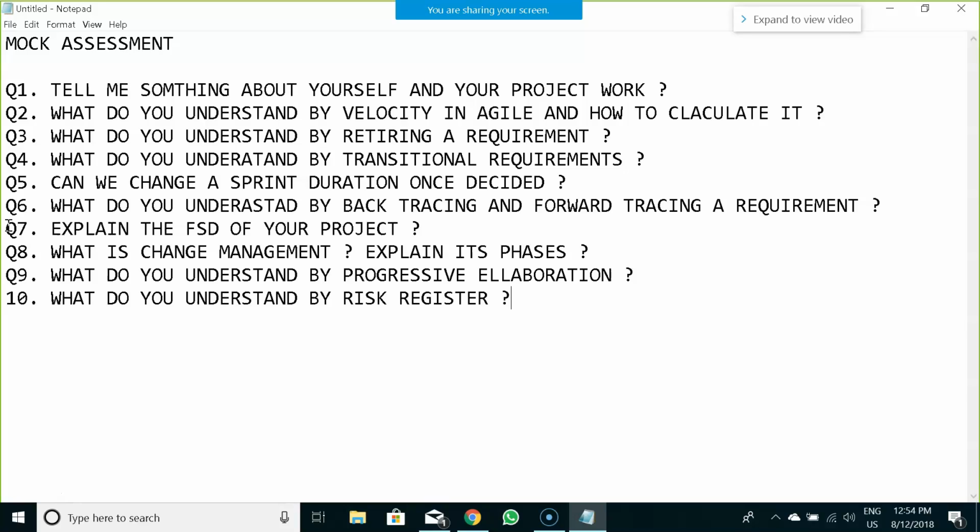Risk register is a repository of all the risks identified in the project, like the nature of the risk, who we have to reference, and who will take the responsibility of that risk. Sometimes, for example, if we are implementing only a payment system and we didn't include all the cards which are allowed in the system, then it will be reduced functionality for the user, who can't use all the cards, kind of that.